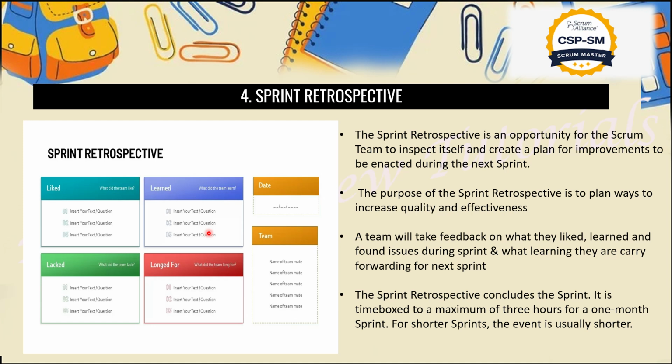Now what happened? The Scrum team will share a feedback form, or something similar. There will be a board in the meeting room, and they will paste sprint feedback there, whatever feedback we want to give. It will be anonymous, first thing, wherein everyone will share their feedback, like what they liked in that particular sprint. What they developed is not the question here. Whatever we have learned, what we have lacked, what challenges we have faced, whatever feedback people want to share, they will share here.